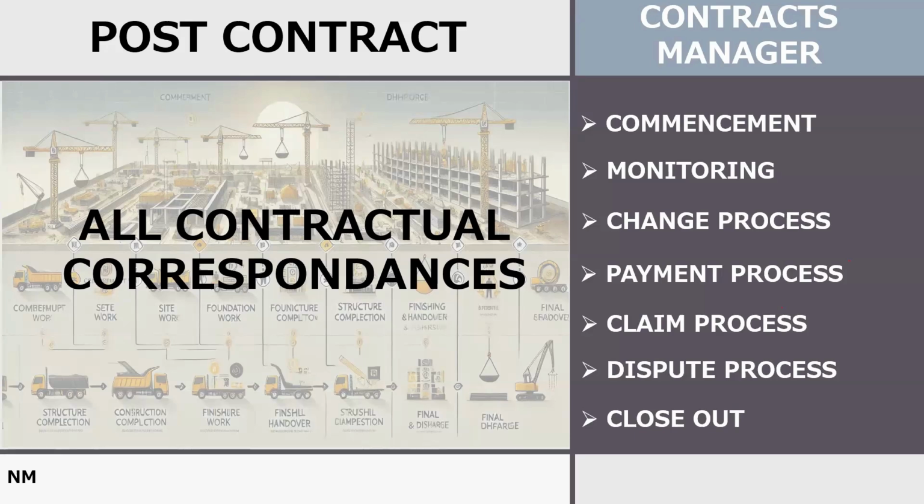For example, he has to give possession of the site, whether in full or in segments. It differs from project to project, but you have to understand what your real obligation is and perform it. If you fail to perform it, it will become a breach, which will give a right to the other party. From the other party's side, a contracts manager has to recognize whether the employer has given you possession of the site as stated in the contract. If so, it is okay. If not, there will be a breach, or there will be damage to you in terms of delaying the project. So you have to reserve your rights, place your notices, and prepare claims. Likewise, I'm explaining this as an example with the limited time.